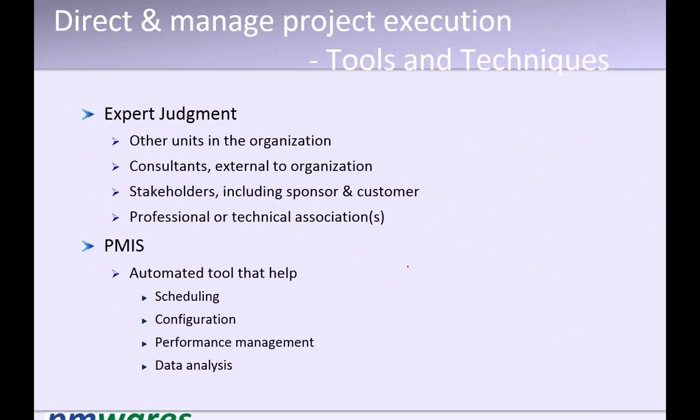Okay, so one question. What is the difference between corrective action and defect fixing? See, we come to the scope, then I will tell you. There is a project scope, there is a product scope. So when you act on the product, it is a defect. When you act on the project, it is a corrective measure actually.